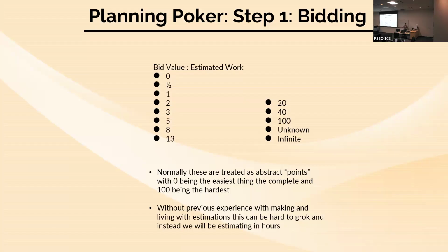And that is why estimating in points can sometimes be helpful, because then it's like, well, I said it's a 5-point user story. That doesn't mean I'm going to get it done in 8 hours. It just means that's about where I thought it was going to be. But if you estimate, say, I'm going to take 5 hours on this, then you on yourself feel this has to take 5 hours because I estimated 5 hours. And your manager might feel, oh, you've been working on it for 5 hours. Why isn't it done yet? Both of those are kind of like bad scenarios you want to avoid.